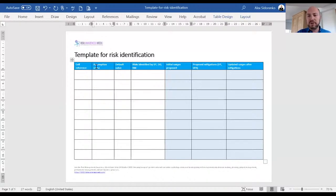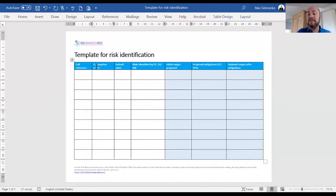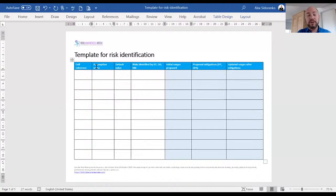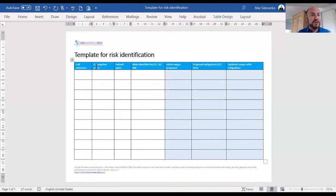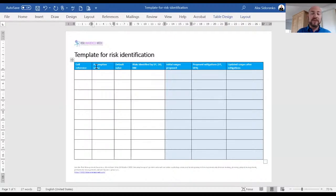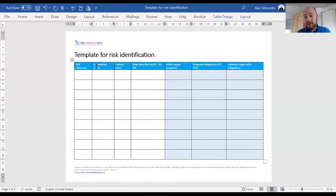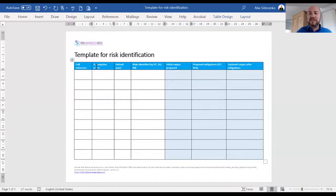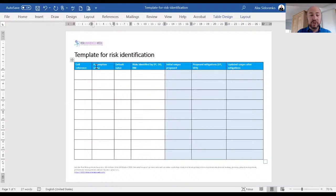Next column is assumption name. That's just basically listing out what's in that cell reference, whatever the assumption is. It could be foreign exchange rate, interest rate, local interest rate, USD interest rate, market growth, change in the price, price itself, number of staff, overhead costs, cost of equipment, loan amount. All of those are typical assumptions that you would have in the decision model, and you list out all the assumptions.